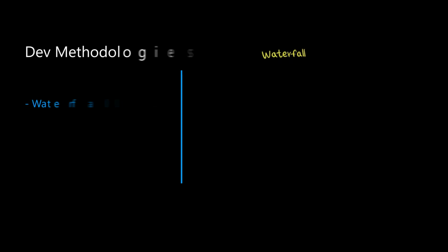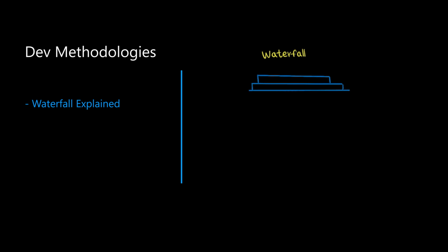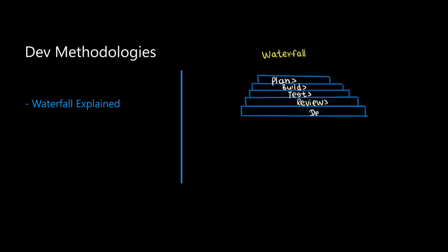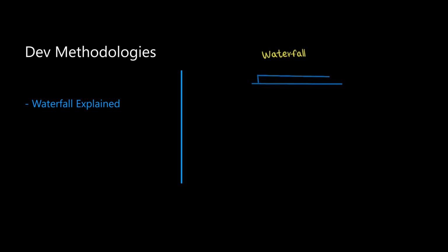The textbook also covers development methodologies you need to know. Waterfall is the traditional sequential approach where each stage gets signed off before the next one starts. It works when requirements are well understood up front, but it is higher risk because there is no going back. If you miss something in requirements, you are stuck with it until the product ships.